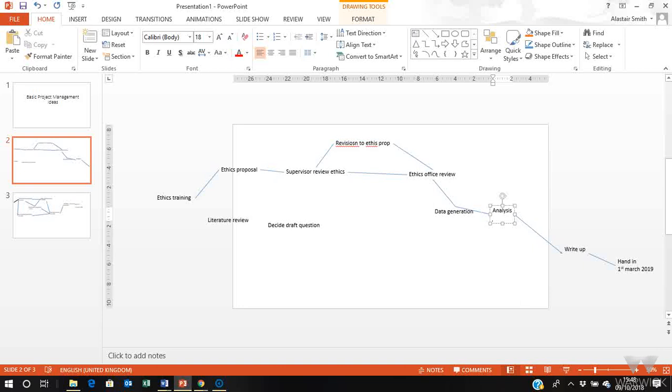No idea. Well, actually, let's say my methodology, at this stage, I think it's going to be doing some interviews. It's going to be doing, let's say, 5 really key stakeholder elite interviews with members of the council about the food waste management situation. Each interview is going to be between an hour and 2 hours. So the absolute maximum amount of time the physical interviews could take, 5, so that's 10 hours possibly, but I've got to get there, I've got to come back. Councillors probably have got other things to do with their lives, so it's not just going to be about me. Let's go for a month. It may well take a month to get that done.